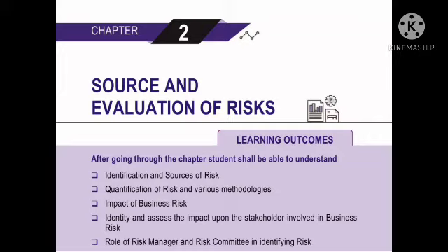The risk identification process is a constantly evolving process as new risks emerge during the business life cycle. The frequency of iteration and who participates in each cycle will be different with different projects. The project team needs to be involved in the process so that it can develop and maintain a sense of ownership and responsibility for the risks and associated risk response actions. Additional objective information can be provided by persons outside the team.